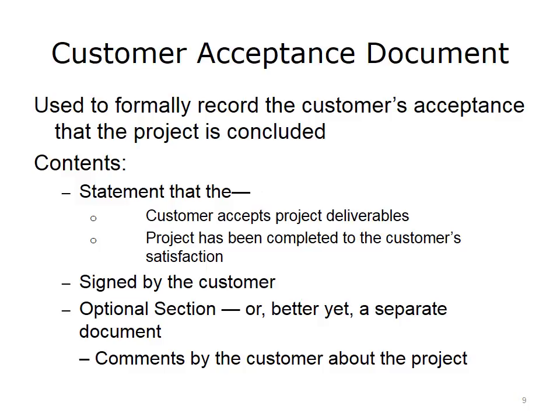Be sure that the appropriate person signs the acceptance documentation. In a community physician's office, this could be the physician or office manager. In a large academic institution, it may be the chief financial officer or the chief medical information officer. Identifying this person early in the process is critical. If someone other than the identified person signs the acceptance document, be sure to document why there was a change.